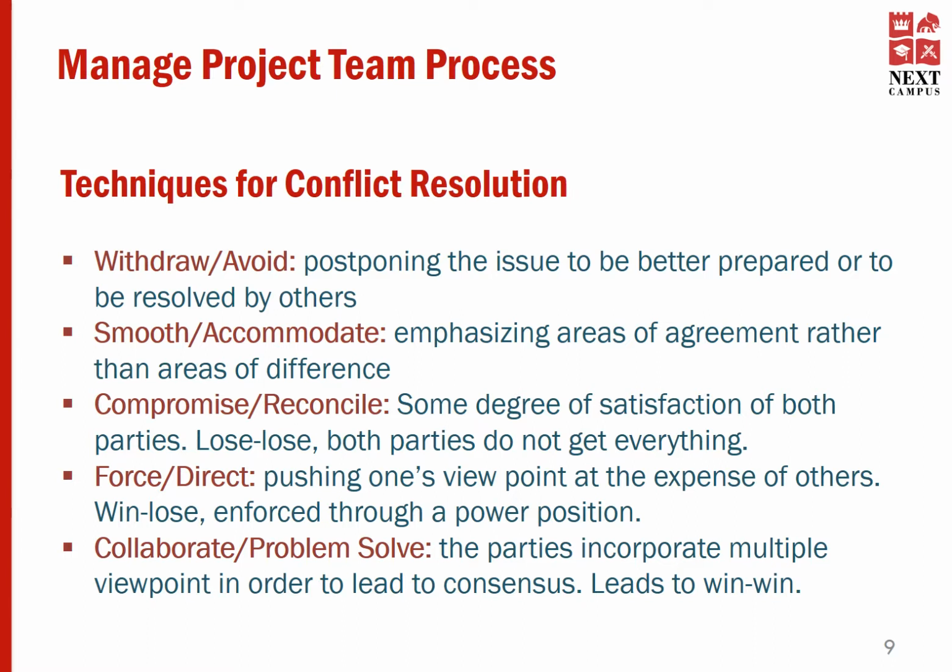And the last technique for conflict resolution is collaborating and problem solving. The parties incorporate multiple viewpoints in order to lead to consensus. And this is leading to win-win situations in projects because you brainstorm about the possible ways, possible methods to solve a problem or to resolve a conflict in this technique. And since you lead to a consensus, since everyone agrees at the end of this technique, this leads to a win-win situation.